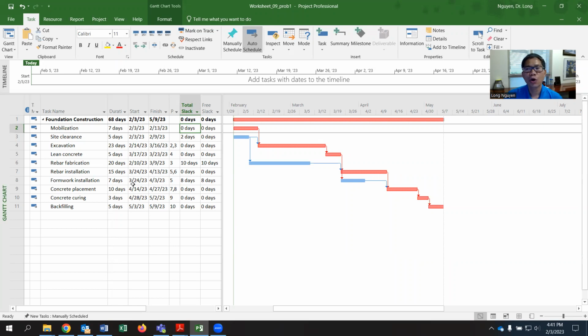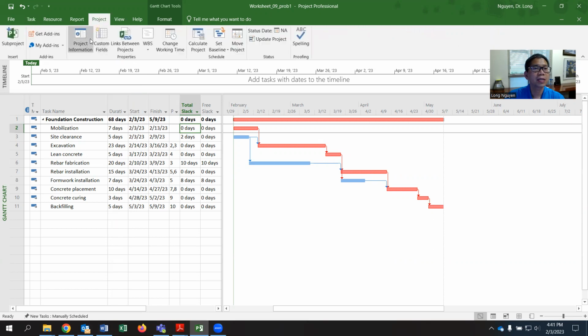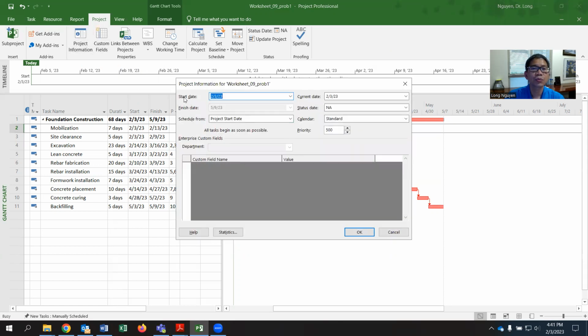Now, the project does not always start on the day that you create the schedule. For example, here, the day I record this video is February 3rd, 2023. Right now, if I want to start 1 year later, I plan for next year, or whatever day you have, how can you do it? You go to the Project tab here, and you select Project Information. You see Project Information, and it shows you the start date.